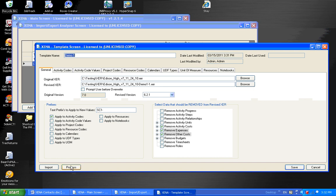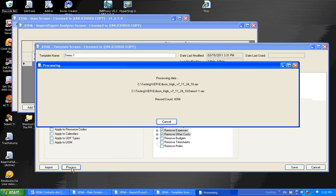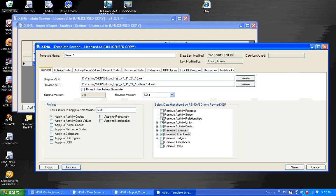And I'm going to process. And process is the step of reading in that XER file, applying any changes that we entered, such as prefixing those activity codes with SC1. And we're also creating that revised XER file. Once that revised XER file is complete, it can be imported into P6 using P6's standard import feature. And that's the general idea of XER.